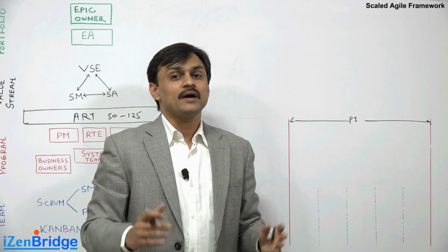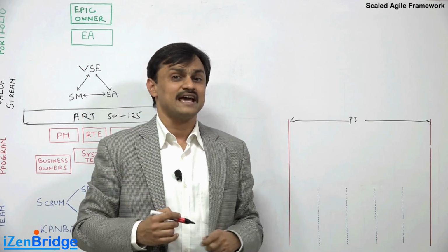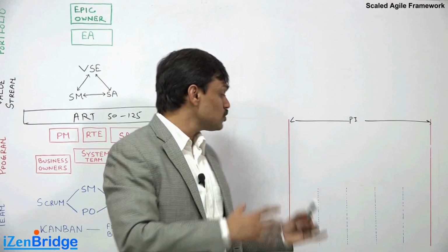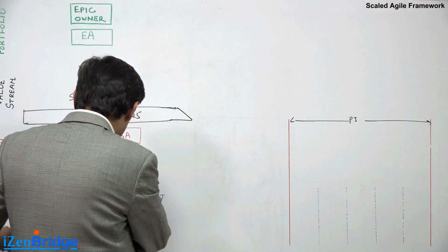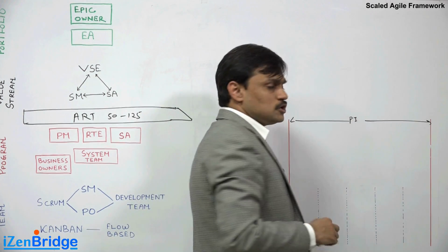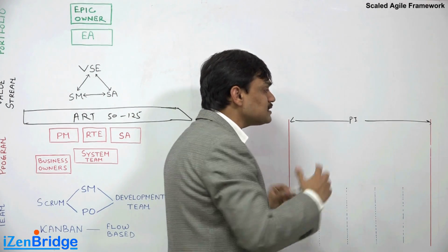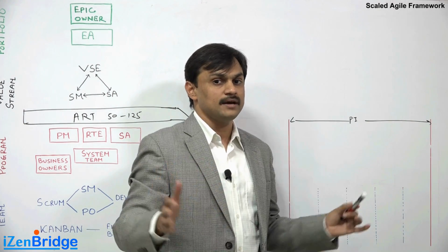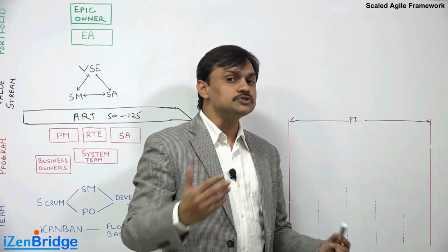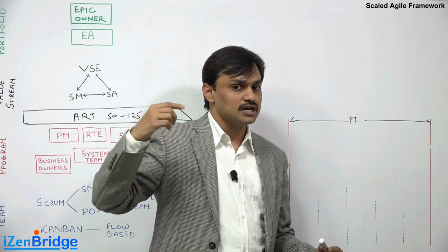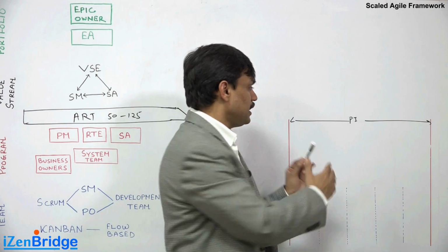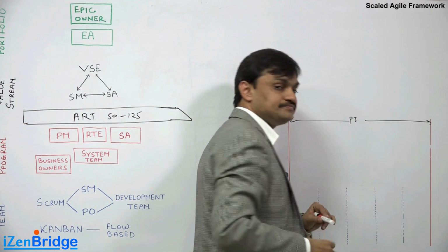Now, working with Agile, you might have already observed that we don't work in 10-week sprints or iterations, we work in 2-week iterations. Yes, so there is another smaller box for teams which is 2 weeks. In simple language, if the program increment is 10 weeks, it will have 5 iterations. Each iteration will run for 2 weeks, and overall in these iterations we are trying to create what we have planned for a given program increment.